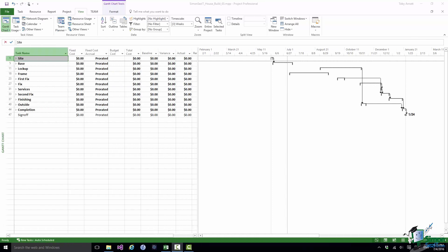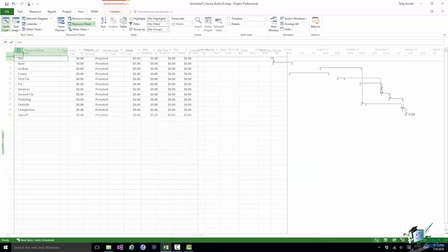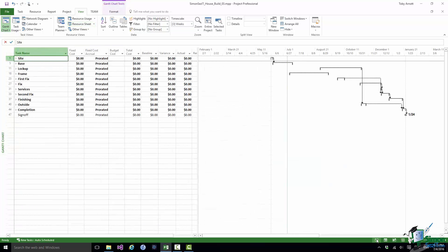I'm back here at the House Build project, Version 3. If I go to the Resource Sheet you'll see that currently the Resource Sheet is empty and there are no costs or resources assigned at all on this project yet. So one thing that I might do very early on in a project like this is to prepare a budget. I might say for example the labor costs are going to be $40,000, the material costs are going to be $30,000, and the legal costs are going to be $10,000. Then during the course of the project I'm going to want to see how the project is progressing against my budget.